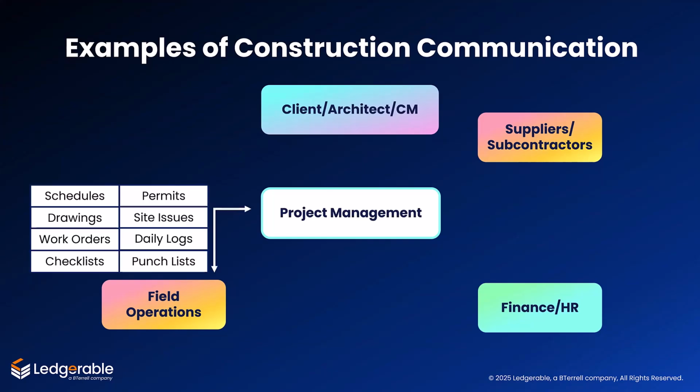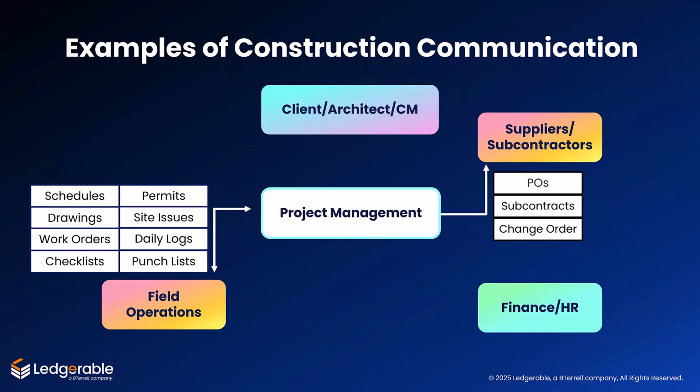Project management must provide instructions to field operations and subs. This includes drawings, schedules, checklists, and work orders. In turn, field ops must provide updates on work performed through daily logs and report on issues that occur at the site. Project managers often issue POs and subcontracts and change orders to subs and suppliers.